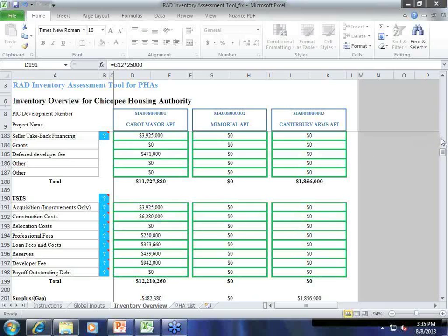Hello. Hey, Len. I have a question back on the RHF funds. Are those eligible for the preparation costs of the application and the PCA, or do you have to wait till it's a development deal? No, you can use up to $100,000 of public housing funds on pre-development expenses without asking us for any special permission. The RAD notice allows that. So even for the RHF funds?